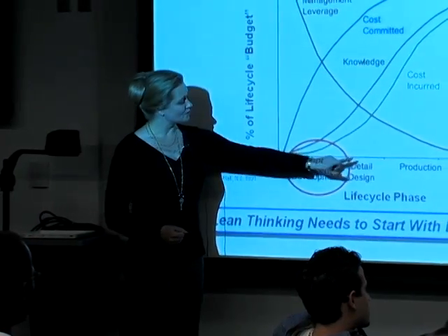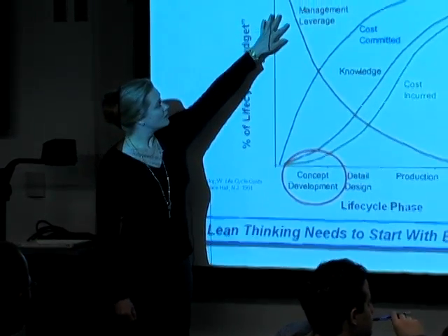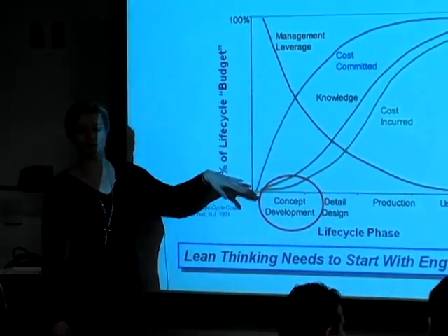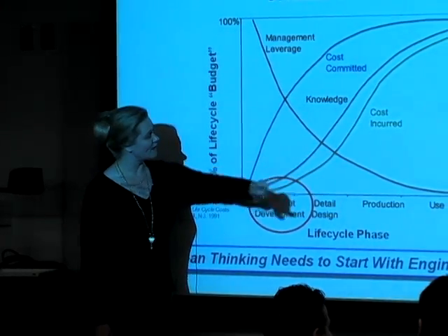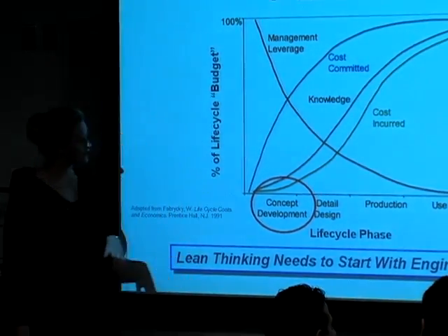At the same time, as we move through this process, the leverage that management has to make any changes starts to go down dramatically because a lot of the knowledge and the cost is being committed there.